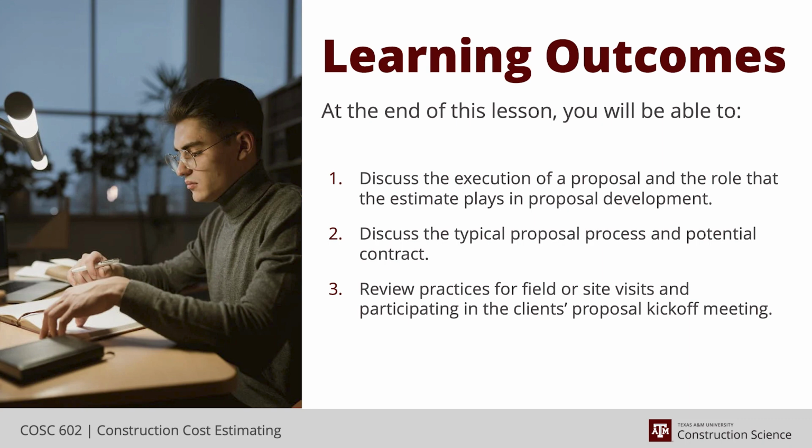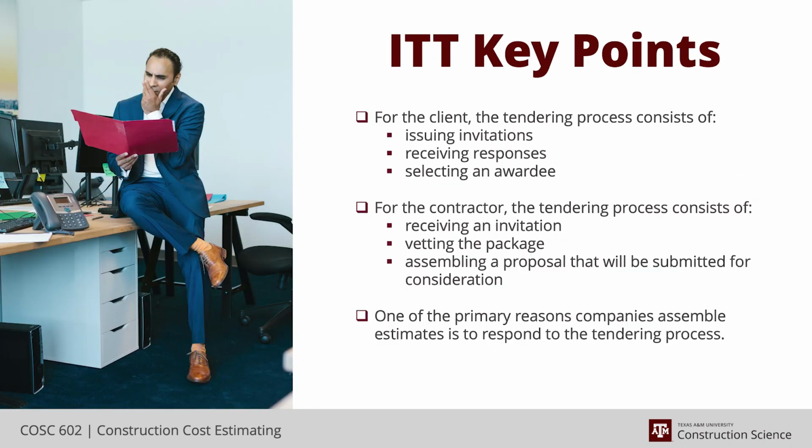Most of what I did at that time was actually negotiated, and I know that the building construction, it's more or less you submit your bid and they'll have an opening and there's decisions made right there, while industrial really tends to be more interactive as the process moves along. Generally, high level, the tendering process from a client perspective is issuing an invitation, receiving and interacting with those responses, and then making an award.